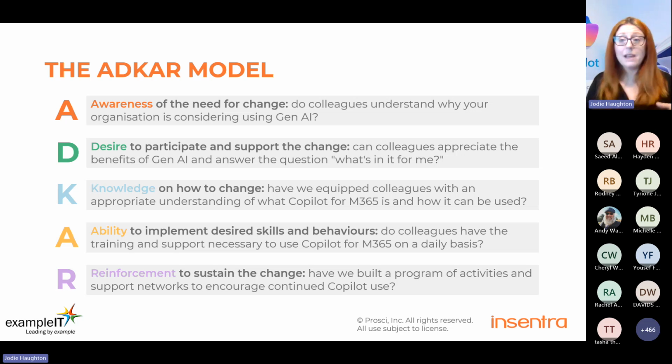We fully recommend that we start building up a sponsor coalition, so a little team of people to act on behalf of the sponsor. And that can often include people like line managers and preferred senders, because research shows that when it comes to your organisational messaging, your comms team is best. But when it comes to how does this change affect me on an individual basis, then line management is actually the preferred sender for that to help those messages land.